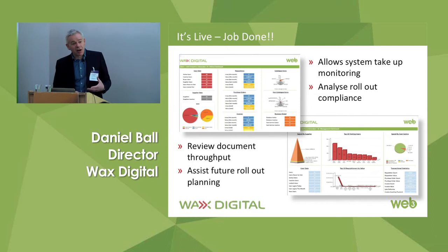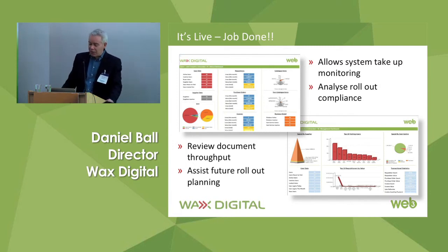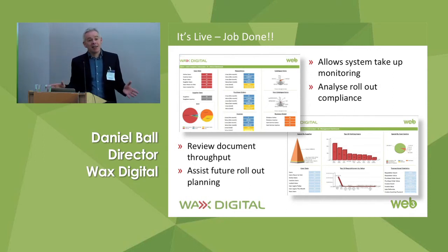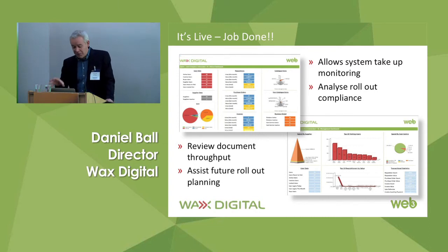But that is just the start. The big learning here when it comes to setting goals and measuring success in a P2P project is not to think like an IT project manager, where the focus is on a project plan that ends at the point that the solution goes live. You are not IT project managers, you are senior procurement professionals. So you have to think about P2P not as an implementation project, but as a 3 or a 5 or a 10-year program, of which the system implementation is only the first phase. So implementation is not an end in itself, it is just the beginning of the process.